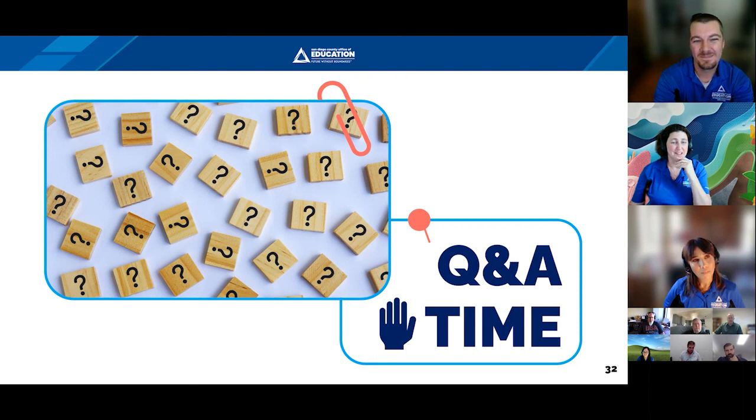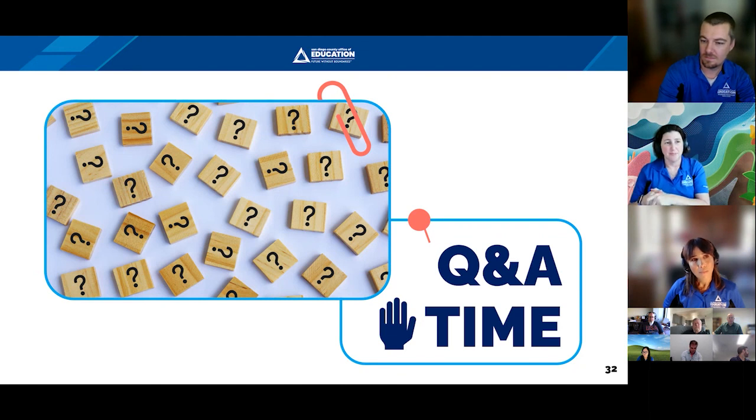Yeah, I'd say talk to the team member themselves and see if they can identify what's blocking them. If not, oftentimes I'm managing a project, but I am not that person's boss. So sometimes I'll go talk to their boss if I need to find out. They might say, hey, I've got 7 projects and I'm just not able to get them all done. So then that's a conversation with their boss to say, look, what we need to prioritize. This person can't get this all done. No fault of their own. There's only so many hours in the day. So I'd say starting with the person, but then escalating from there as needed. Again, as PMs, our role is to clear those roadblocks, so seeing what we can do to do that.